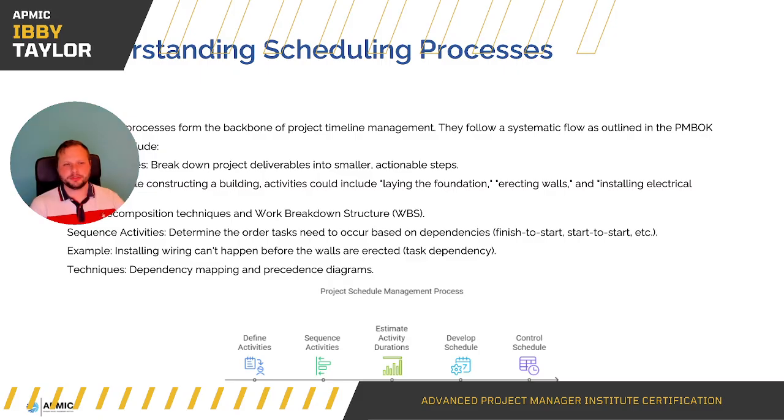Let's look at some key points. Scheduling processes form the backbone of project timeline management. They follow a systematic flow as outlined, of course, in the PMBOK. Now, define activities. Break down project deliverables into smaller, actionable steps. While constructing a building, activities could include laying the foundation, erecting walls, installing electrical wiring. So the tools are decomposition techniques and work breakdown structures.